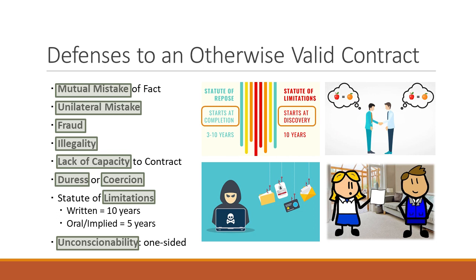So that's general contracts. In Illinois and many other states, they've created special statutes shortening those times. So in Illinois, it's 4 years from the discovery of the problem, when you knew or should have known. So when that roof starts to leak and you see the water dripping, it doesn't matter about the contract, whether it's oral, written, or anything else, you need to make a claim within 4 years of when you saw the roof dripping. It's not 4 years from when the roof was finished. It's 4 years from when you knew the problem started, and then you have 4 years from that. But it's not open-ended. That's called a statute of limitations of 4 years.